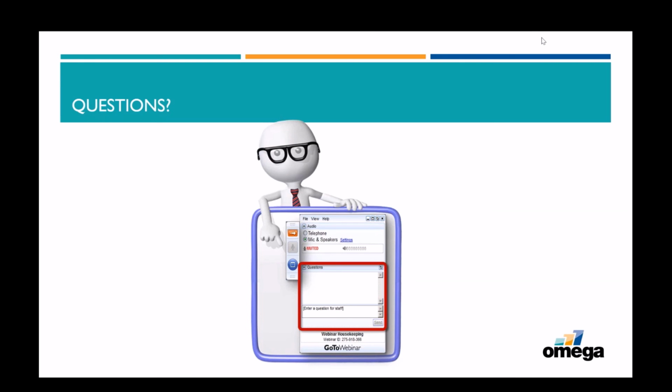Yeah, we see here something about the location and escalation for different locations, and that is supported. So you can have different escalation factors based on currencies, based on locations, and within each location you can have it based on different cost categories again. So it's very powerful, with very detailed possibilities there.